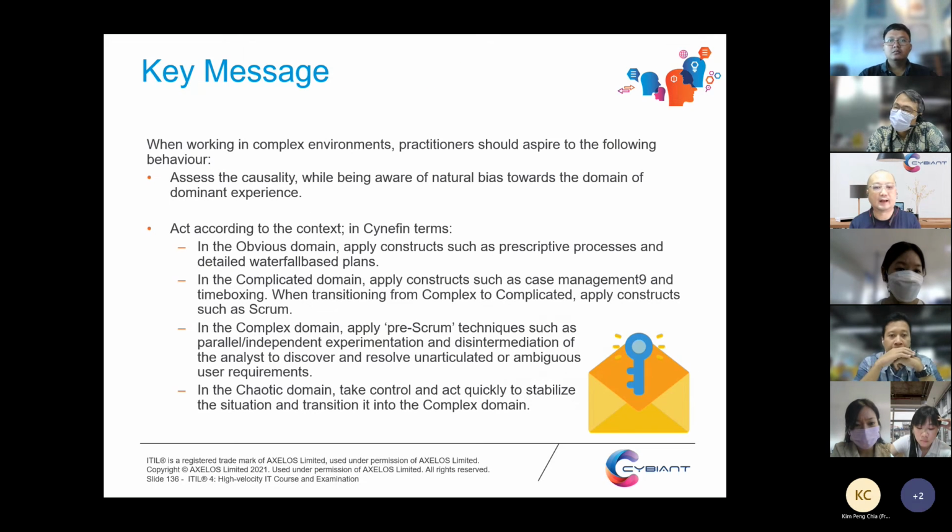Now, this explains how we use the framework. It says here, if it's obvious, apply a prescriptive process and follow the plan. If it's complicated, use case management and time boxing, or apply constructs such as Scrum. If it's a complex domain, apply pre-Scrum techniques. If it's chaotic, take control and act quickly to stabilize the situation, and put it into a complex environment. So basically, let's go back.